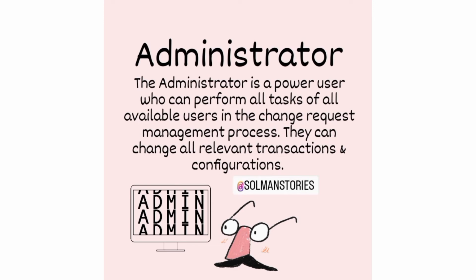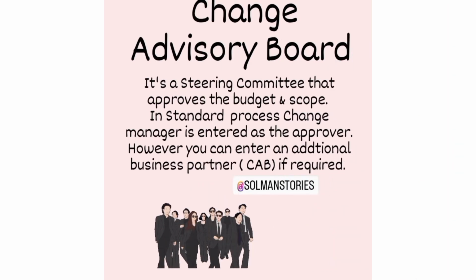Change advisory board, it's a steering committee that approves the budget and scope. In standard process, change manager is entered as the approver. However, you can enter the additional business partner as CAB if you require.